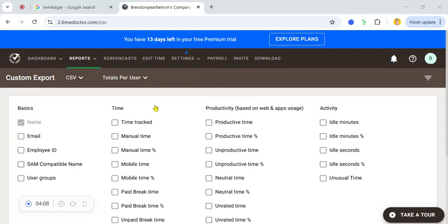Right, so a simple daily workflow would look like this: you select the client project before starting the work. You choose the specific task and apply the correct tag to that, like we showed you earlier. You start the timer and you work normally. While you work, you can add brief notes at the end of the session describing what was completed. This routine keeps tracking consistent and ensures reports remain clear and useful. When teams follow a workflow like this daily, the client reporting becomes almost automatic.